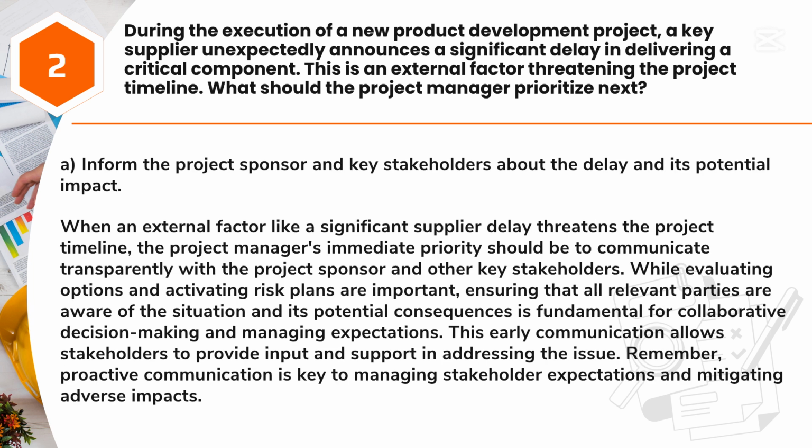Answer: A. Inform the project sponsor and key stakeholders about the delay and its potential impact. When an external factor like a significant supplier delay threatens the project timeline, the project manager's immediate priority should be to communicate transparently with the project sponsor and other key stakeholders.